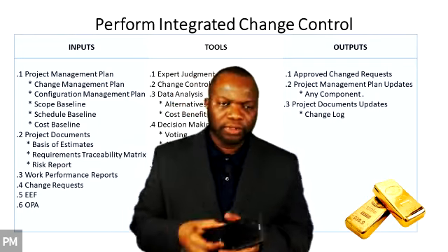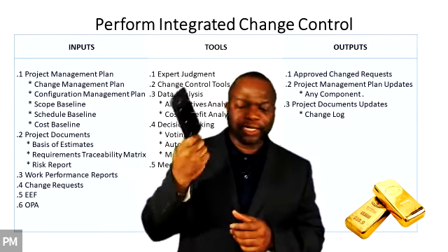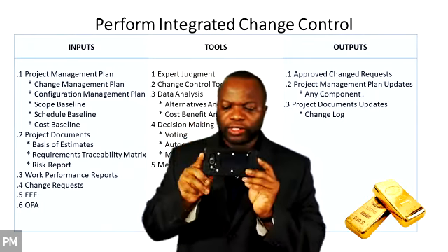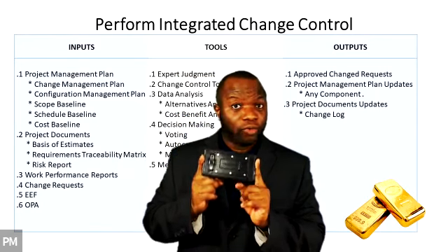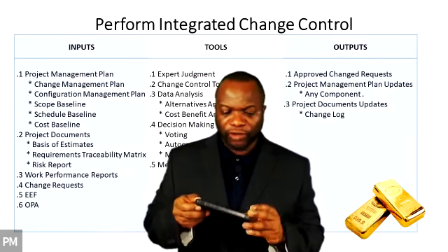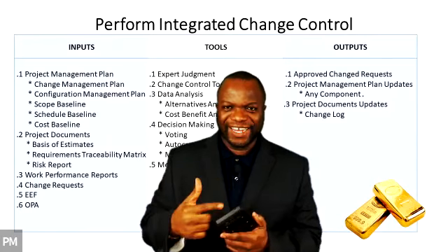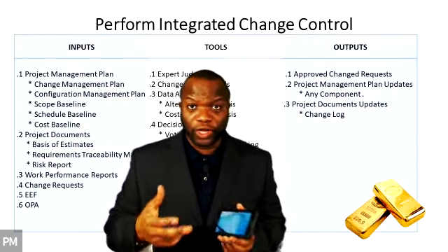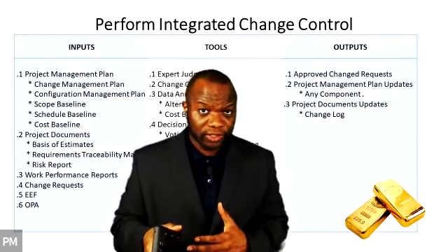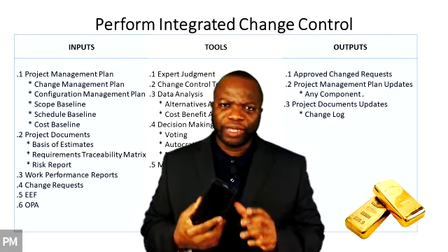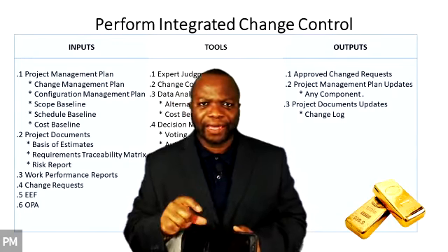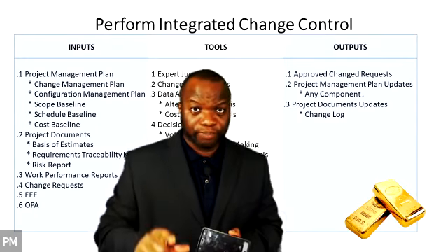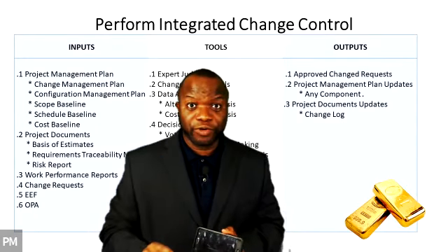What does all this mean? This is a deliverable that our project is meant to satisfy. What are we going to do in configuration management? We're going to take note if the dimensions have changed. We're going to record that. If the actual software on the system is changing, we're going to record that. If the interface is changing, we're going to record that and what version of the interface it is. All of these could be looked at as documented in a spec document. Updates to specs. Specs. You got to remember it's specs.